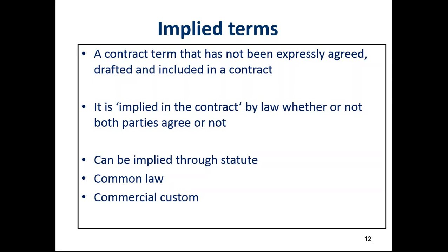So that's the APR, annual figure, 8% plus the base rate, which is then divided by 365 multiplied by the number of days late. And I have the right to charge for that under UK law, the Late Payments Act. You may therefore not write an express term that attempts to remove that because it is always there. Under the Act, it says payment must be made in 30 days or less.